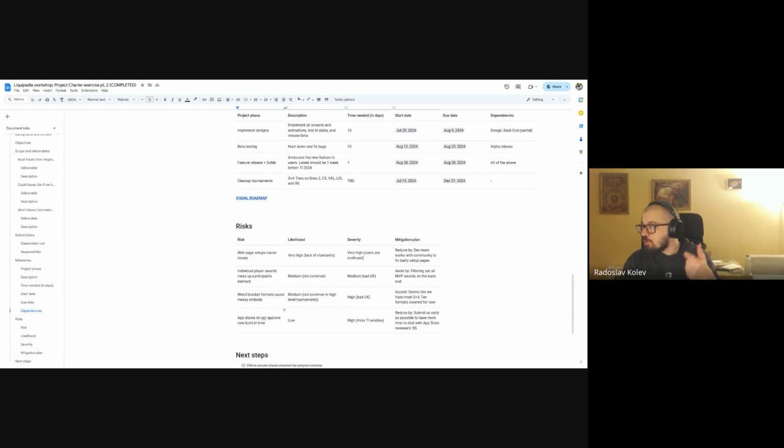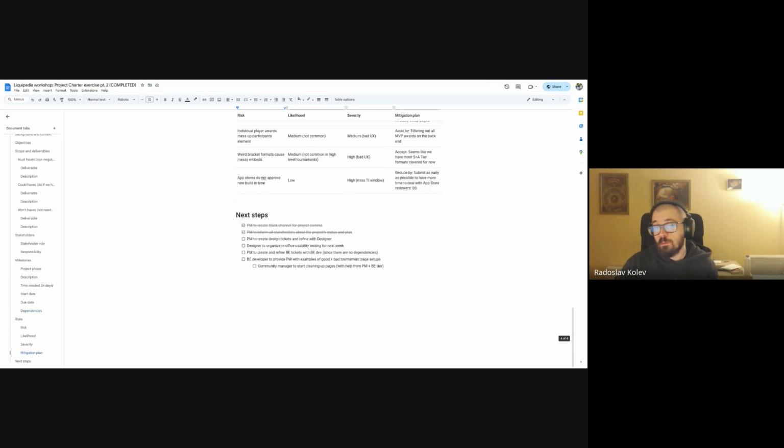If you're releasing a small feature or a couple of big bug fixes, a couple of days of testing is all fine. But if you're releasing something like, hey, we're releasing three battle royale games with hundreds of tournaments, maybe 3 days is indeed a bit optimistic. As a PO, I would say, maybe allow yourself a bit more time, maybe 2 weeks of testing. It's better to be safe rather than release something broken.